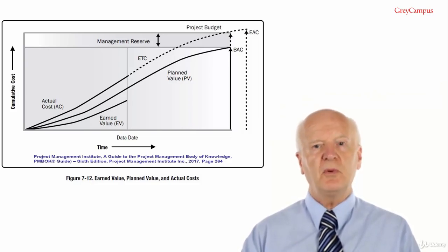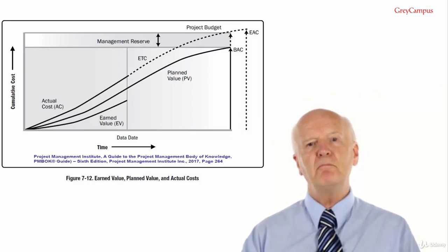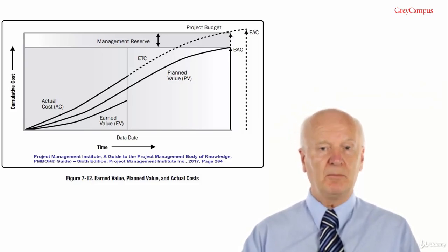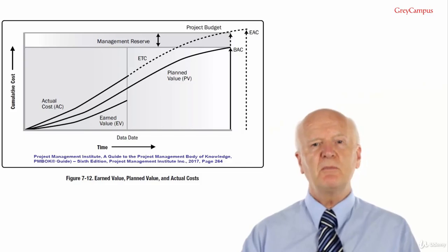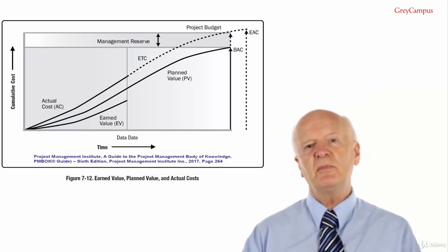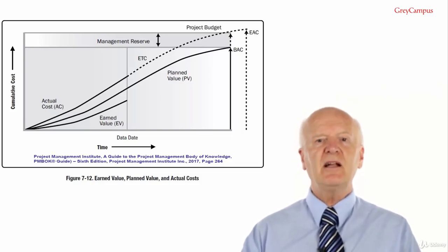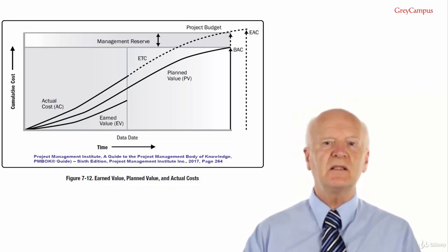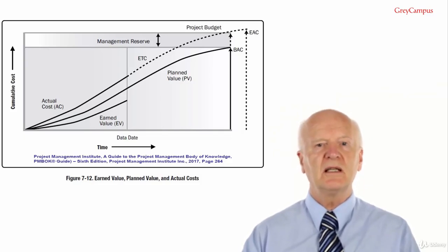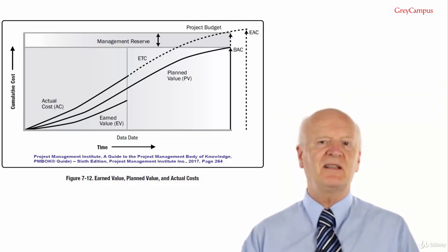And the most important technique is a manual summing up, bottom-up summation. This bottom-up EAC method builds upon the actual costs and experience incurred for the work completed and requires a new estimate to complete the remaining project work. The equation is EAC equals AC plus bottom-up ETC.